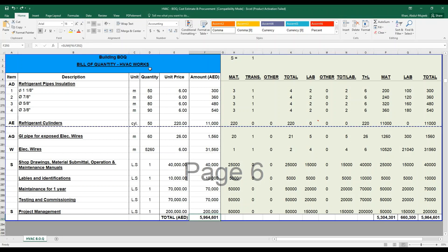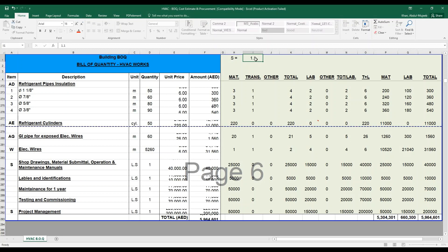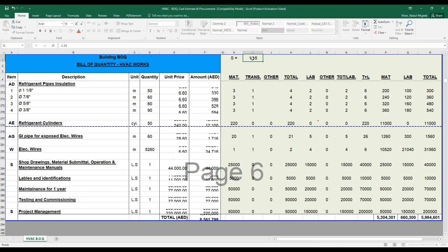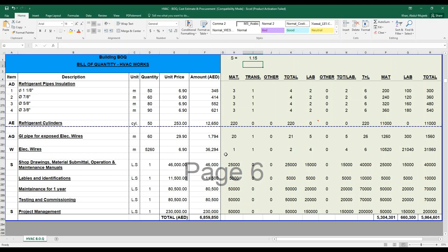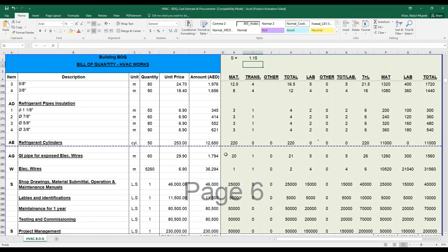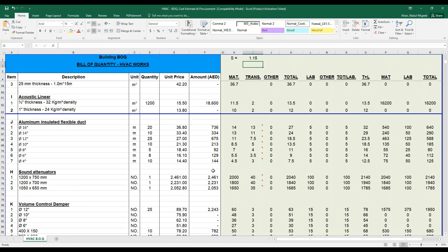As an engineer or bill of quantity estimator or procurement engineer, you have to consider some amount of safety factor while preparing a bill of quantity. Based on your experience or initial assessment, you can keep the safety factor at one to one percent, or add it as 10% of safety factor to the total bill of quantities, or 10 to 15% based on your requirement or the project requirement. This is a simple sample. There are various other Excel sheets which are more complicated, in a precise way to be done in a more professional manner. This is just an example for your understanding as a basic HVAC engineer to understand how a basic BOQ is taken for an HVAC work.